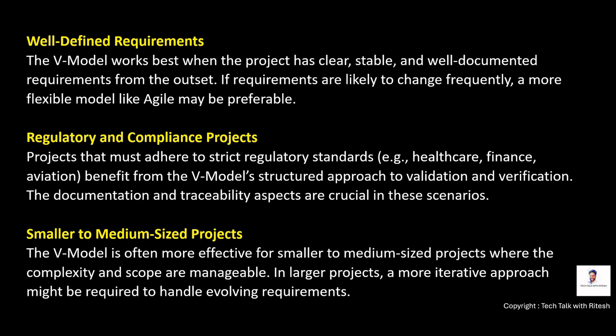Regulatory and compliance projects. Projects that must adhere to strict regulatory standards, for example the healthcare industry, finance industry, aviation industry, right? Because there we need every phase to have done the correct job. We need revalidation of each phase, so that is a good example where we should use it. It benefits from the V model's structured approach to validation and verification. The documentation and traceability aspects are crucial in these scenarios, such as healthcare, finance, aviation, or anything related to legal.